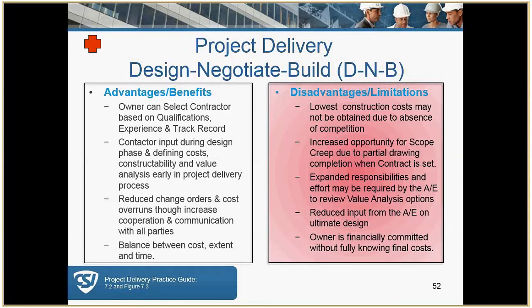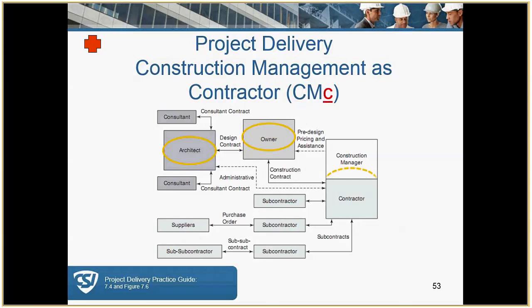Next, we have project delivery, construction manager as contractor. This process allows the CM to participate in pre-construction activities. Again, it helps establish a GMP early on, and the CMC would be the contractor on this process.